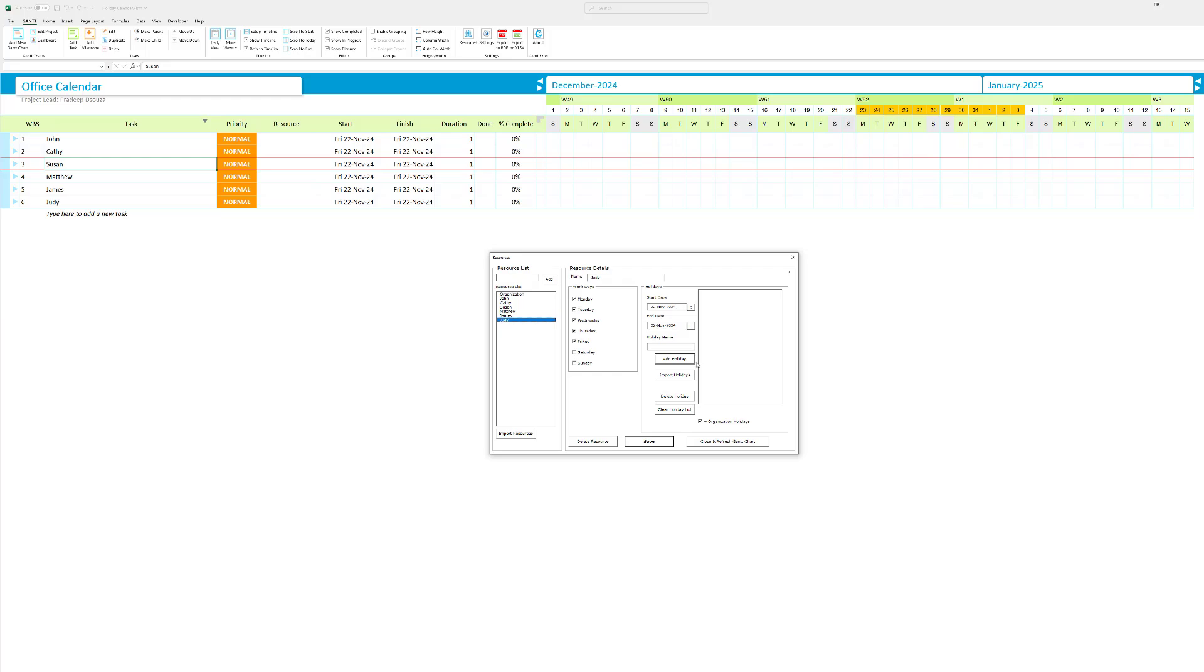Also, I just want to bring to your attention that you can import resources. So if you have your resources in a separate Excel file, you can just click on import resources and import all the resources into the program. So if you have a long list of holidays and you want to import all the holidays for the year 2025, you can do that over here. So I'm going to hit save and I'm going to close and refresh the Gantt chart.